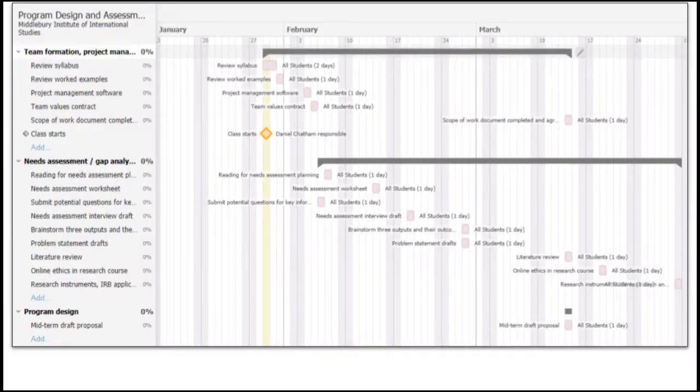As I said a few minutes ago, a Gantt chart is a really useful tool to sketch out the process that you'll go through. And the great thing about project management software is that the Gantt charts are automatically generated from the tasks and the task lists. So this is an example of something that is produced as a report in the system. It's not something that you have to manually create. All you do is keep track of the tasks that you're working on and what categories or lists they belong to. And then you can see the project at a glance in a Gantt chart. As I said, this is also a great way to keep track of lots of information in a very concise way.